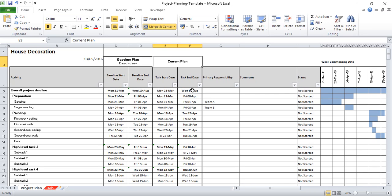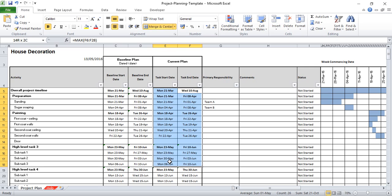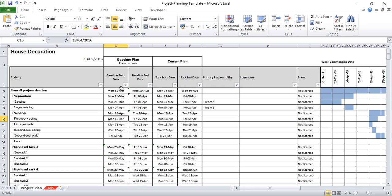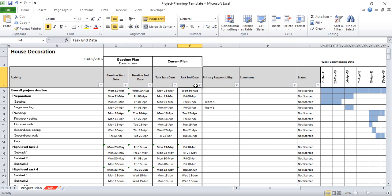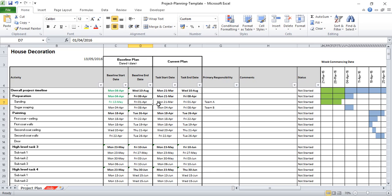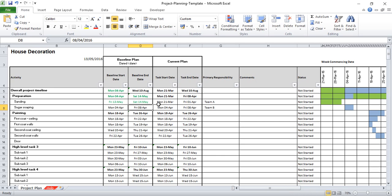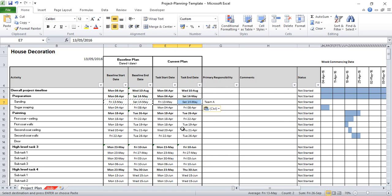The current plan is showing what you as the project manager believe is your latest start and end date for each task. This will show any stakeholders whether you're still working to that agreed baseline plan. So if we're creating a plan right at the beginning, then our baseline start will be the same as our current plan start and our baseline end will be the same as our task end date. Let's say we start the sanding today and plan to finish tomorrow, and we can use those dates for the current plan dates.